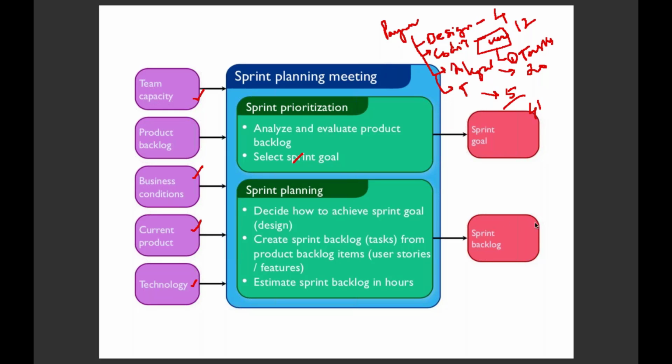Let us say in total they have, as a team, 90 hours they are going to work. So this is consuming 41 hours. So another 49 hours are there. For this 49 hours, they may choose another feature, right? Whatever features they have listed and chosen, and the task estimation is done, that subset of features is called the sprint backlog. Now they build a sprint backlog.